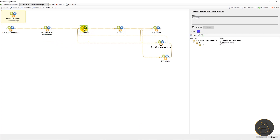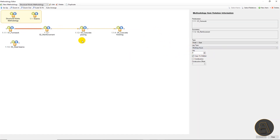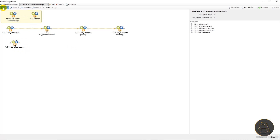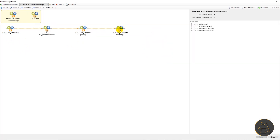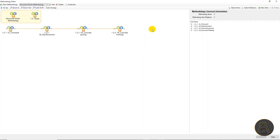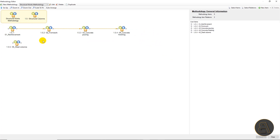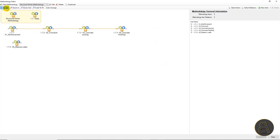I'm back with all second levels defined. As you can see, all concrete works have defined formwork, reinforcement, concrete pouring, and concrete finishing. Steel beams are separated from the concrete ones, and similarly all other methodology items are properly separated — steel columns are separated from concrete ones, and masonry walls are separated from concrete walls.